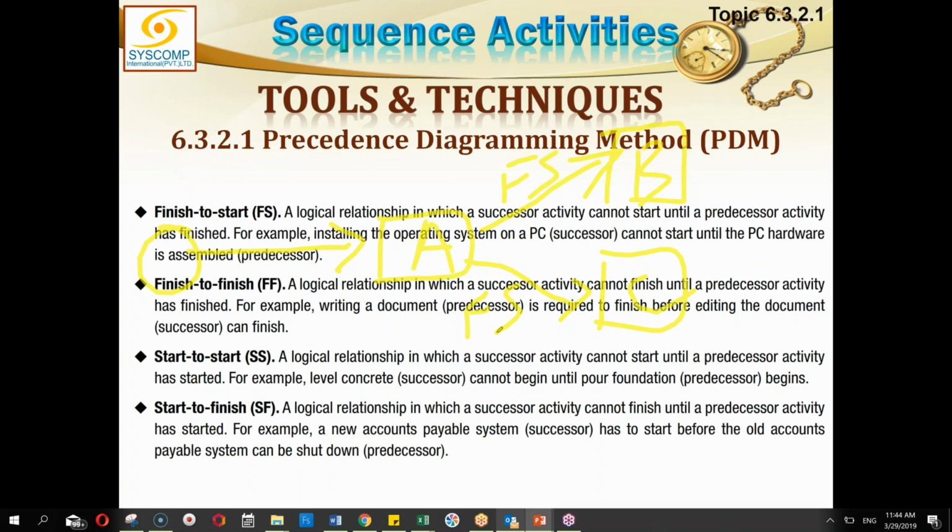You got my point? So I am not talking about the parallelism as such. I am talking about the condition which the predecessor imposes. Here in this case, the picture in front of you, A is the predecessor and it is forcing B and C not to start until it finishes. Now, if A has finished, B and C are free of the obligation. They have not started before A had finished.